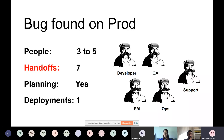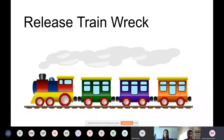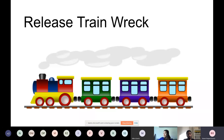The lesson: the later it's found, the more expensive it gets. In big legacy systems, some of you may have heard of the release train strategy — it's basically a scheduled release, once a month on a set date. All work which makes it through QA by that time goes into that release. It establishes a cadence if you have one giant mixed-together legacy system.